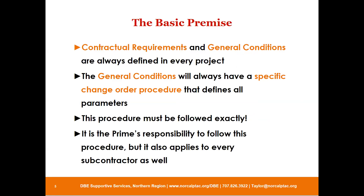The basic premise for any construction contract is always the same. The contractual requirements and general conditions are always defined in every project and spelled out in the bid documents. More specifically, they will have a change order procedure that is explicit and covers every possible contingency and scenario. That procedure has to be followed exactly — both by the owner's rep and the contractor. It's always the prime's responsibility to follow the procedure, but it absolutely applies to every subcontractor as well.